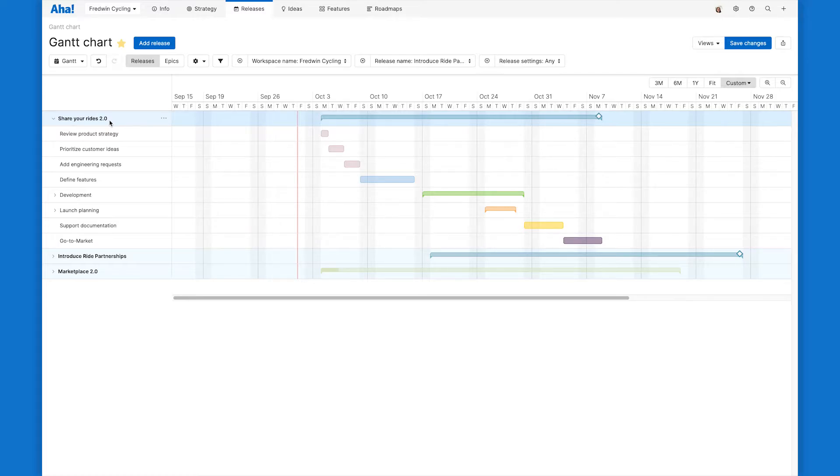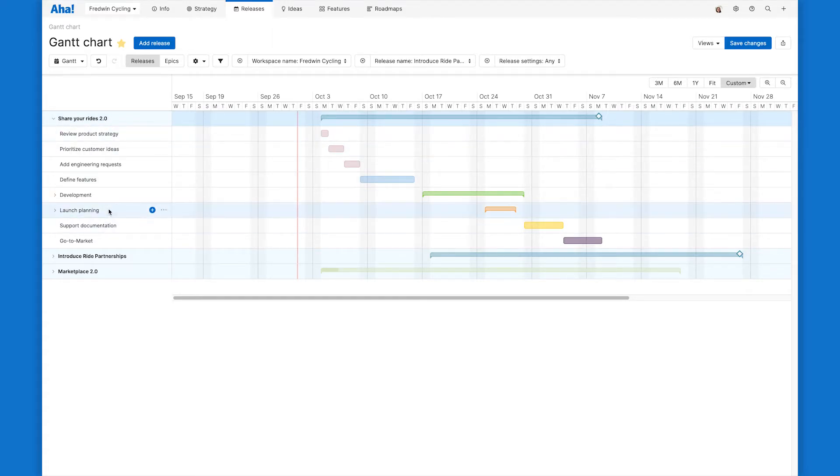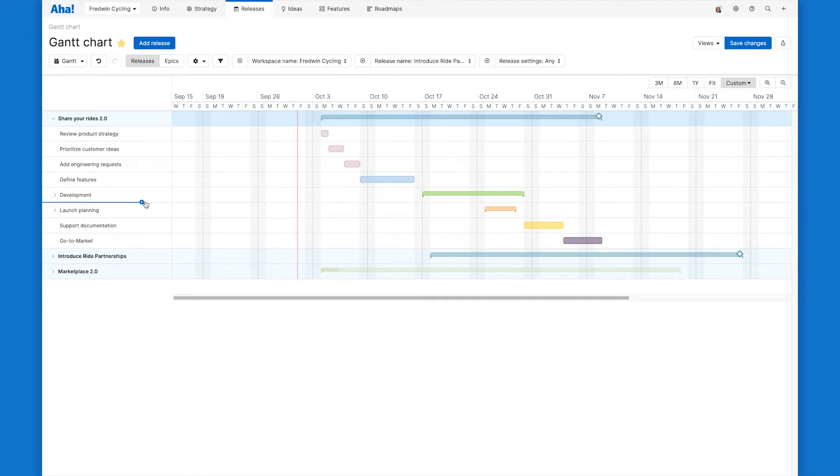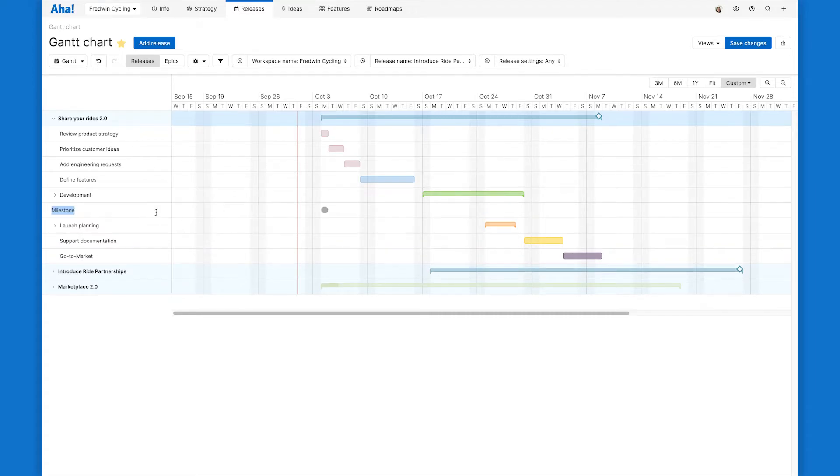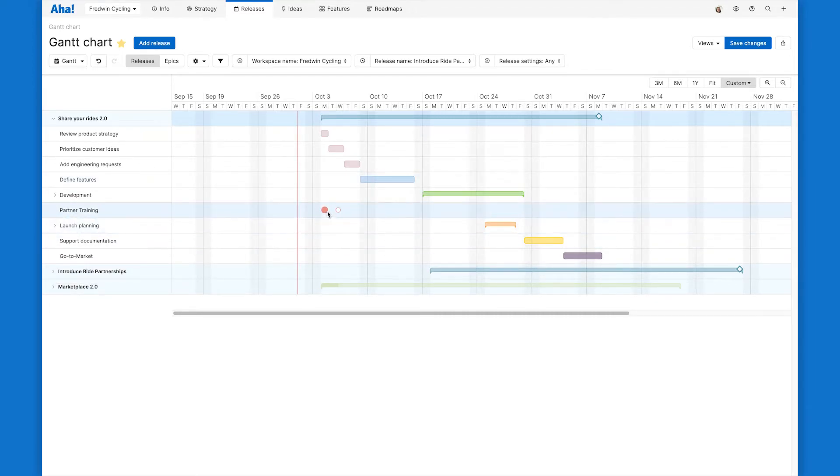The first thing I'm going to add is a milestone. Milestones are basically key dates that you want everyone on the team to be aware of. In this case, I know we have a partner training coming up that we want our development to be complete in time for. So I'm going to add that in line here and then drag that milestone to the right spot on the plan.